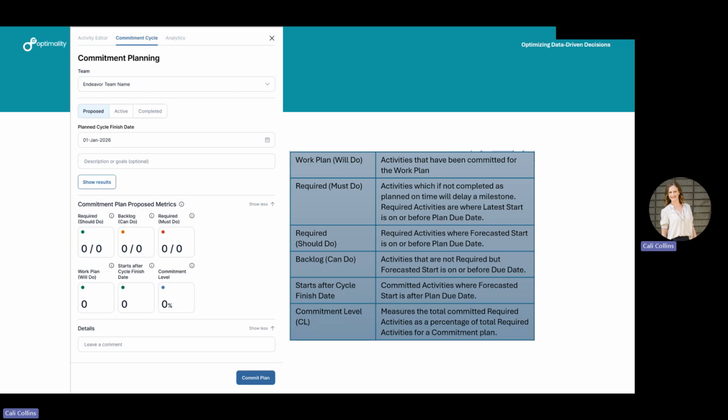If you're looking at it in terms of how P6 may be calculating this, the difference between early start and projected start, sorry, this should say projected start, is that a projected start date will also take into account whether you have it marked as soon as possible or as late as possible. And we'll get into that in a different video.